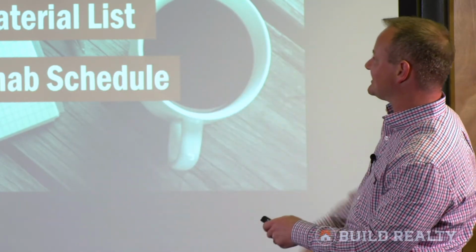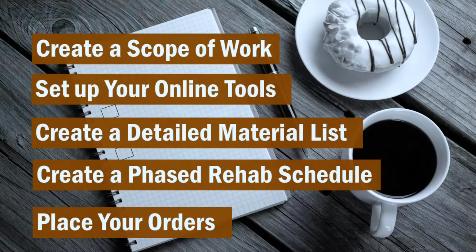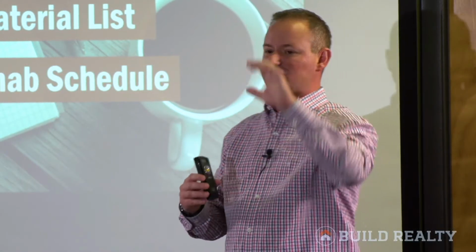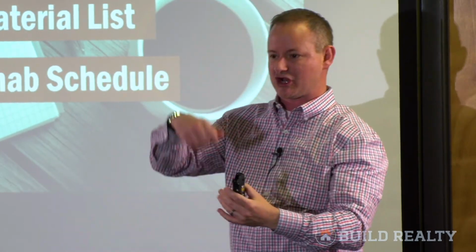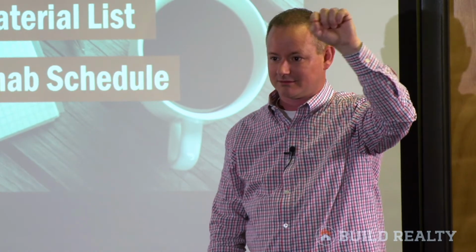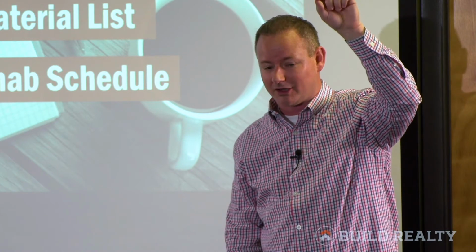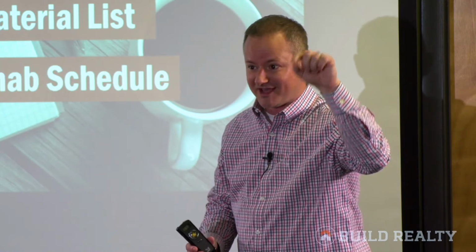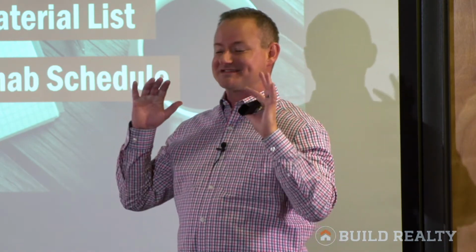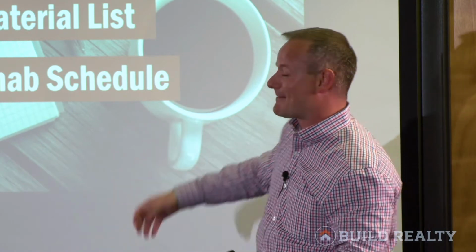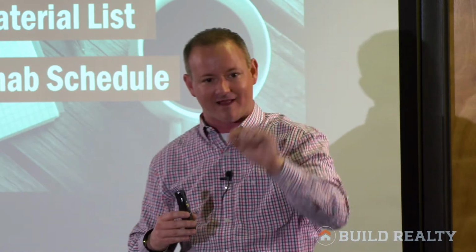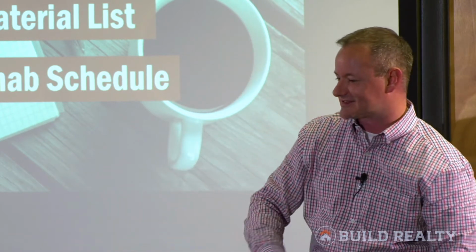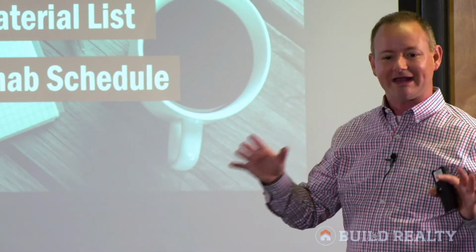So what you're going to do, you're going to take that scope and you're going to take each one of those items from that scope and you're going to lay it on a schedule. You're at least going to say, look, even if you just, on your big list of all your scope sheets, you're just going to write a number next to each one. What phase is it in? Right? If it's phase 1, you'll write a little 1 next to it. If it's phase 6, what will you do? Right, a 6. Yeah, simple. I'm telling you, this is simple stuff, guys, all right? If it's the 6th step, you'll write a little 6 next to it. So you just go back and you line it all out. Does it make sense? Do you need to scan it into some crazy software thing and load it? No. Just write numbers next to it.